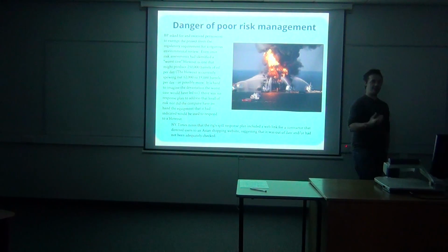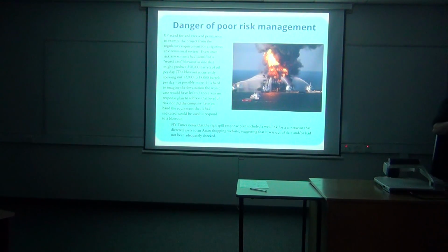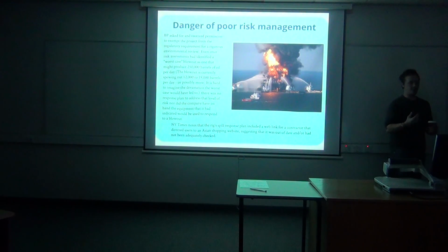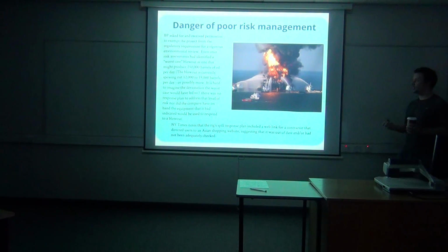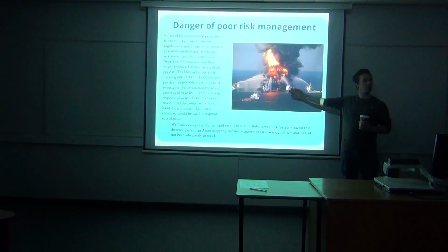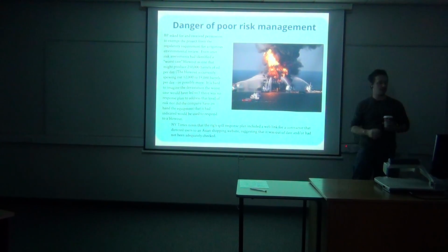Okay? So they saw their internal risks. What if we have this problem? We'll have less production capacity, which will impact on our operations, impact on our economic strength. They didn't incorporate the external risks, which were the environmental risks in this case. And that's what's cost them the money, the billions of pounds over the past few years.